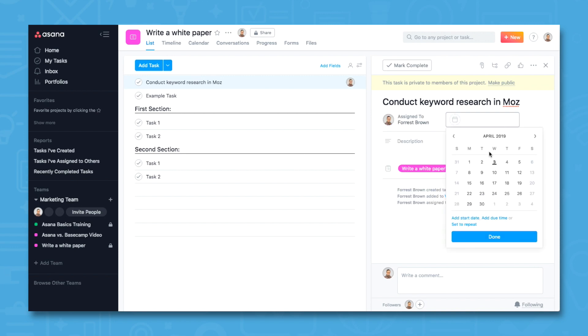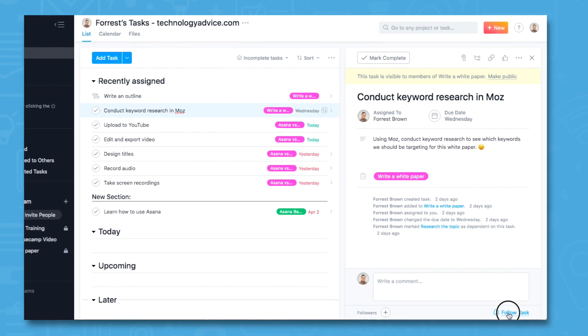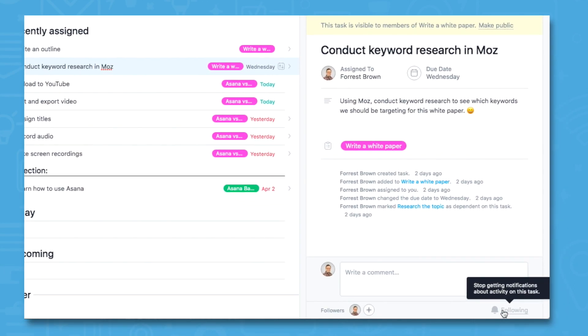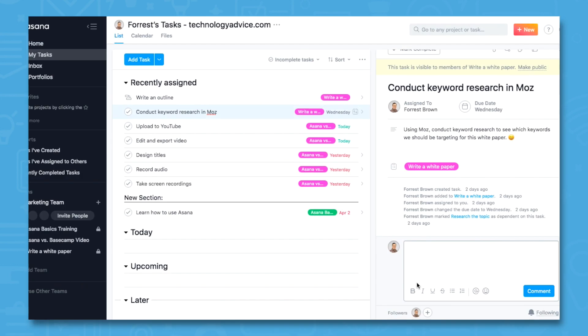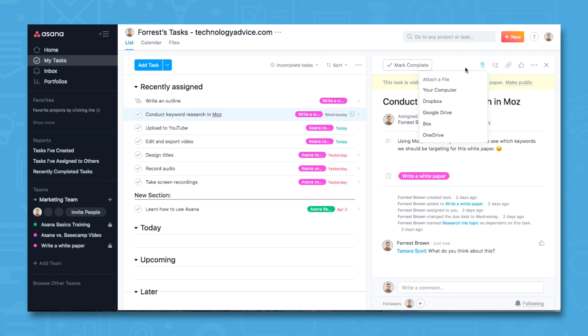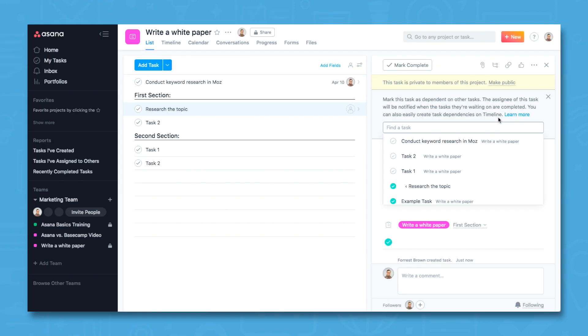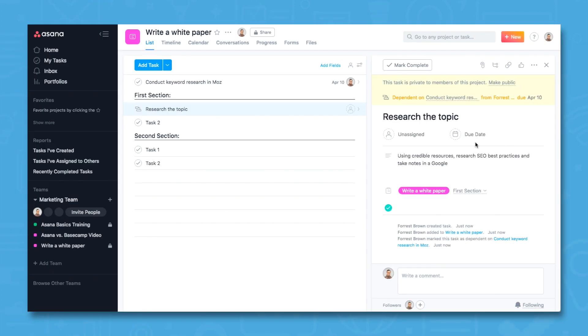As with most other project management solutions, you can watch tasks for updates, mention others in a comment, upload files, and get shareable task links. But Asana stands apart in that you can make certain tasks dependent on others so you don't get ahead of yourself.